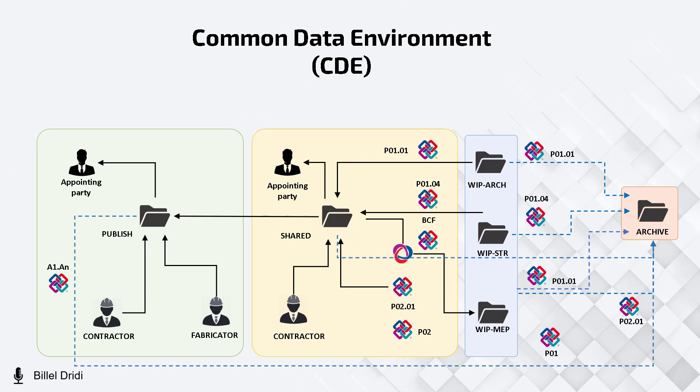The CDE is mainly composed of four subdomains or stages: work in progress, shared, published, and archived. As Group 5, we used BIMSync as our common data environment platform where we carried out all kinds of information and data exchange, creating the four stages as described in ISO 19650 Part 1. We also integrated BIMSync with the powerful communication platform Slack to get all team members instantly notified. BIMSync was the great source of information for the WSIG project for collecting, managing, and disseminating each information container through a managed process.